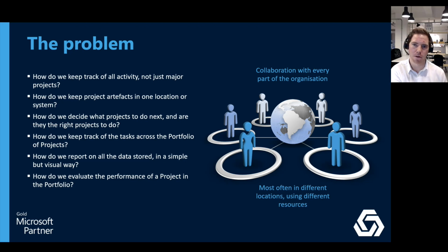So you need someone to put all your project requests into the system, and then we can prioritize them, align them to your strategy, which is true portfolio management, do that ROI benefit case, and then select which projects to do with the resources, cost, investment and constraints we've got available to us.